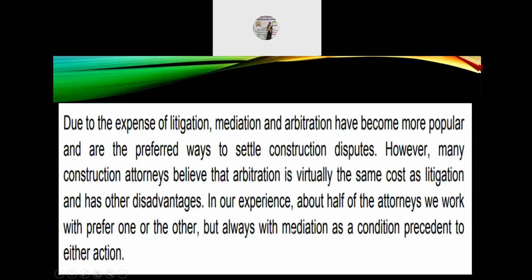Due to the expense of litigation, mediation and arbitration have become more popular and are the preferred ways to settle construction disputes. However, many construction attorneys believe that arbitration is virtually the same cost as litigation and has other disadvantages. In our experience, about half of the attorneys we work with prefer one or the other, but always with mediation as a condition precedent to either action.